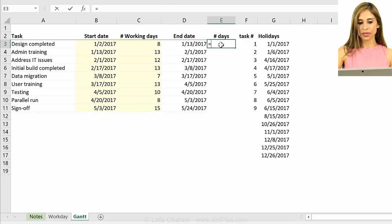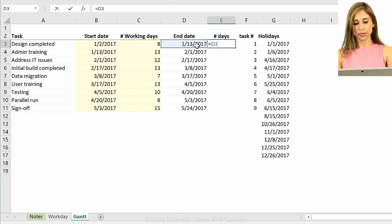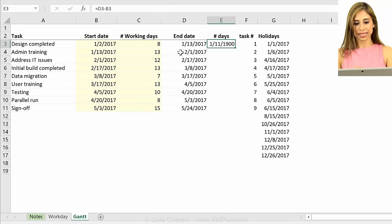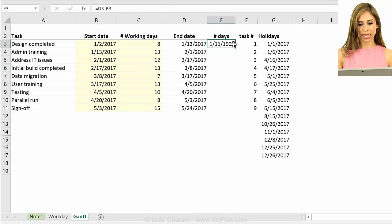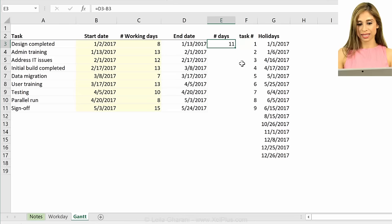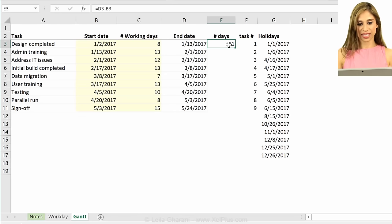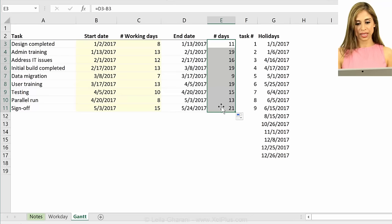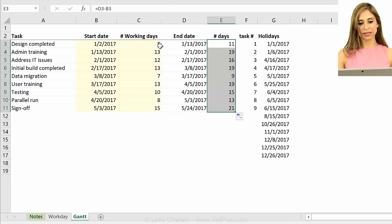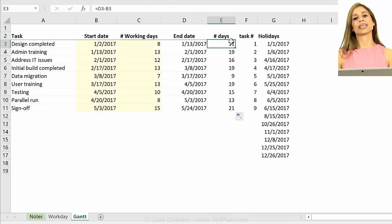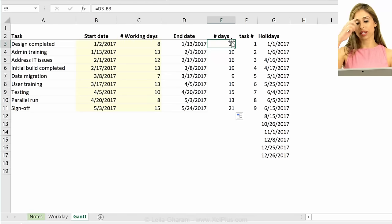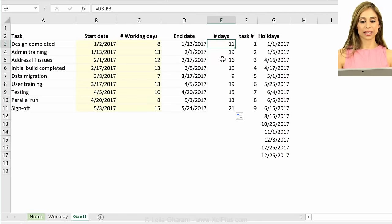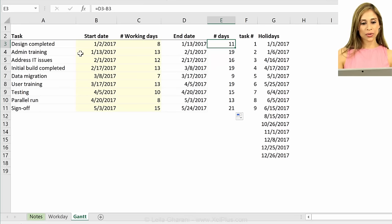Now the number of days, that's just going to be the difference between my end date and my start date, and I need to format it as a number. I'm just copying the formatting of this over to this. So we can see even though the number of working days is 8, the full number of days is 11, because that's how long my task is going to take.